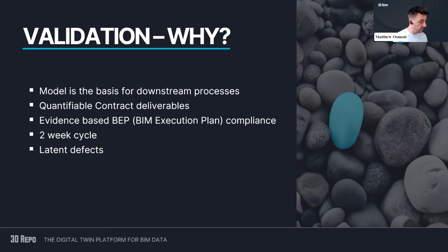That 2-week cycle that I mentioned before is critical, because once you're on that 2-week cycle, ideally, you want to get any issues resolved on day 1, so that they've got basically the majority of 2 weeks to then correct them before the next release. Because if you miss that 2-week cycle, you're then on the next cycle and hoping you get into there.